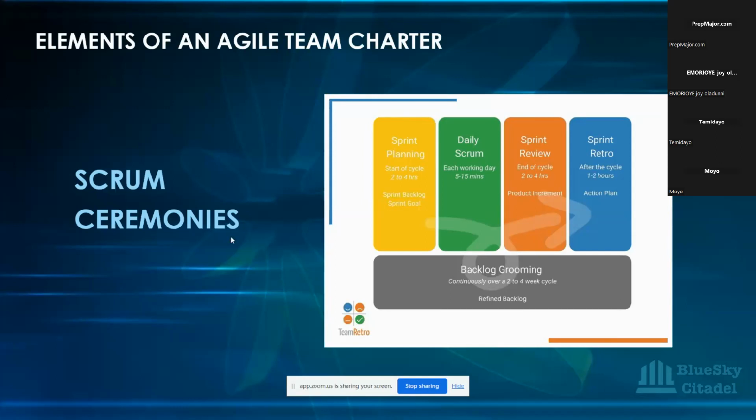And so have an understanding of why each of these ceremonies is important. You could just give it a simple definition, like, "In this meeting we are going to be doing this and that, this is what it will be used for, and this is the time." And understand why each of these meetings is important. So decide on the sequence, the rhythm, the time, the place, and the date for each of these ceremonies. You can decide on the time and date of your sprint planning, your daily stand up, your sprint retrospective, your backlog refinement, your sprint review. Decide on the time that they will be.